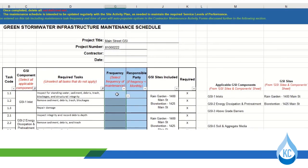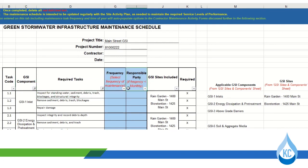Once complete and ready to PDF, the designer should filter the list to hide any blank rows and delete the red italicized text. There are also blank cells at the bottom for the designer to add additional maintenance tasks for any specialty products or components outside the standard GSI component list. The frequency column inputs shown are for reference only and should be deleted prior to printing to PDF. The contractor should update the frequency and responsible party, and can adjust frequencies throughout construction and establishment if site conditions allow for more or less frequent maintenance. This ultimately holds the contractor responsible for setting the frequency needed to meet the required service levels of performance defined in the specifications.